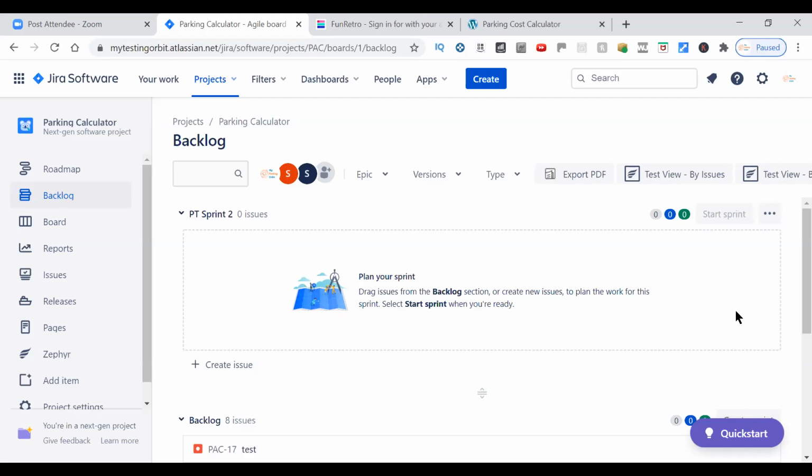As you can see, we haven't started our sprint 2 yet because of course we are still on the last day of our sprint 1. We have completed our sprint 1, but we haven't started our sprint 2 as well. This sprint can be marked as completed either on day 10 or when we are going through the sprint 2 sprint planning meeting. At that time also you can mark that one completed and then start a new one. So it can be done on either of the dates.